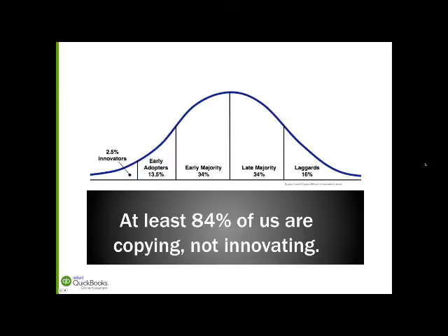So I'm not sure I understand this question. If there's a scope creep and you bring up a change order and they don't want to pay it, then you don't do that work. Or you let them do the work, or you let somebody else do the work, but you don't do it if you think it requires a price.